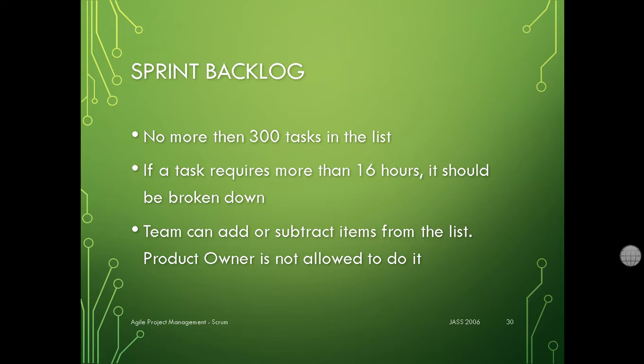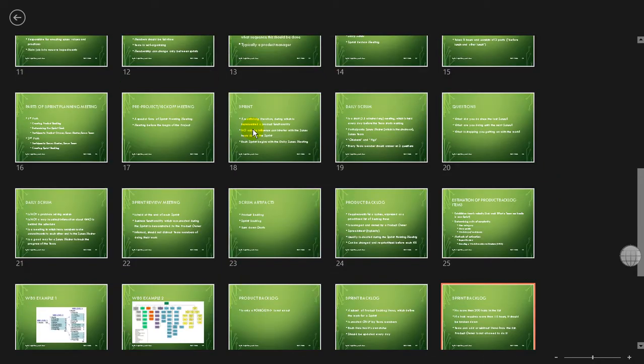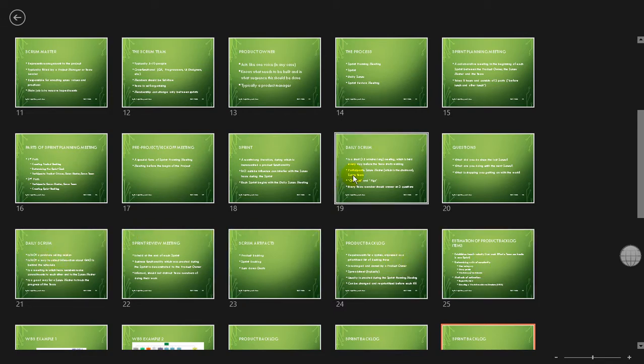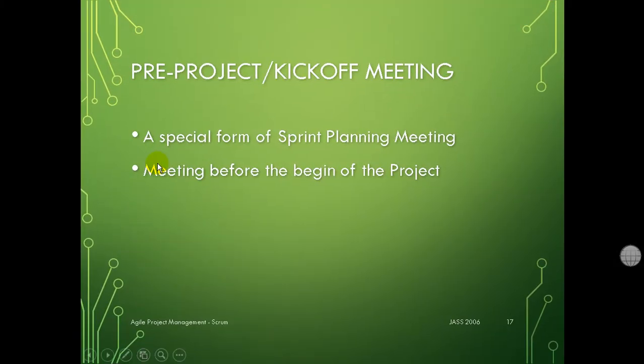Okay, what you need this week is you need to make the sprint meeting. Okay, the sprint meeting in which you determine what you would like. I'm sorry. The first one is the whole product backlog. It should be the kickoff. What was it called? Here we go. Yeah, that one. The pre-project or kickoff meeting that should be done or redone, if you'd like, just to determine what you need to do in the whole project. That's the first thing that should be done.